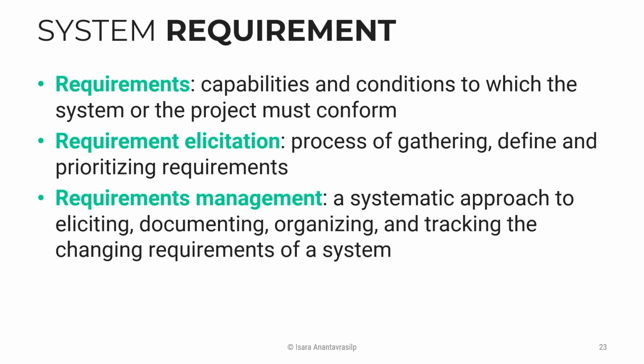And once you have the requirements, you collect them, you elicit them, you need to manage them. Requirements management is a process of effectively managing and controlling requirements throughout the development lifecycle. It involves activities such as documenting requirements, tracking changes, prioritizing the requirements, and ensuring that they are delivered as part of the final product. Requirements management aims to ensure that requirements are complete, consistent, unambiguous, and verifiable. It also involves managing changes to requirements as the project progresses and new information becomes available.